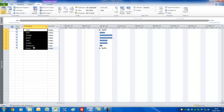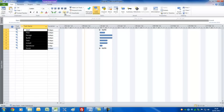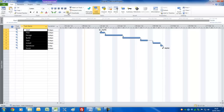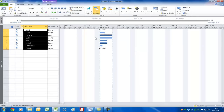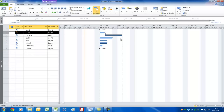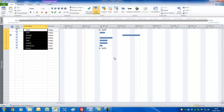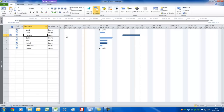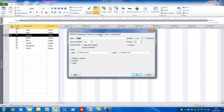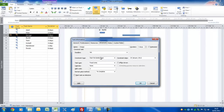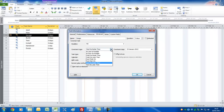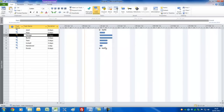We could just link these all together by selecting them all, going to the Task menu, and choosing the link tool — and they'll dutifully do as you say. Alternatively, you could overlay the mouse on the bar itself to get a four-pointed cross, click and hold, and drag downwards to link them together. Be careful not to move the task horizontally, because it will set up a constraint. You can find out information on any task by double-clicking its name. If I go to Advanced, by moving it out in time I've set a 'Start No Earlier Than' constraint, which means there's a brick wall in time and this task will not go before it. So I'm going to put that back to 'As Soon As Possible', which is the default setting. When you link, be careful to go down or up, never left or right, as you might inadvertently drag the task. If you do drag it, you get a little warning sign.